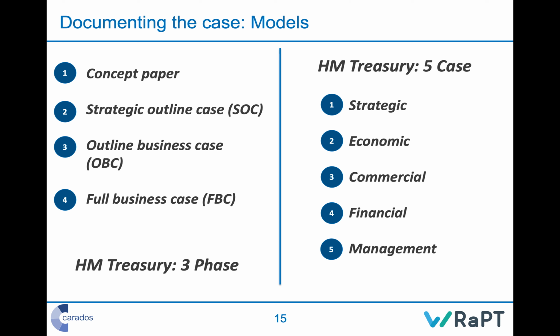So typically if a project involved bringing in a staff rostering system, for example, we'd need to think about what are the commercial options and how we're going to get the best deal from those. So that's why it's different to economic. The financial one is again different to economic because it's about where will we secure the funding from, and how can we influence how much funding we do get, and also influencing how do we maintain and balance and control the economic costs to make sure that they don't get out of line.